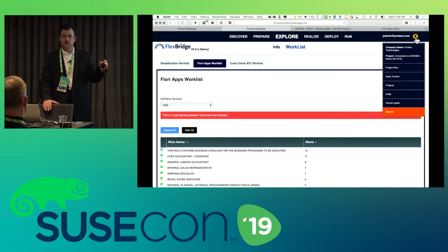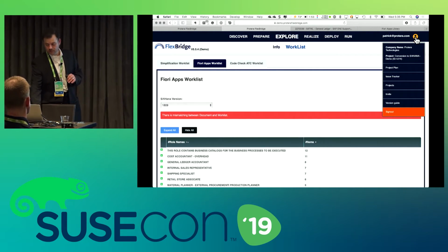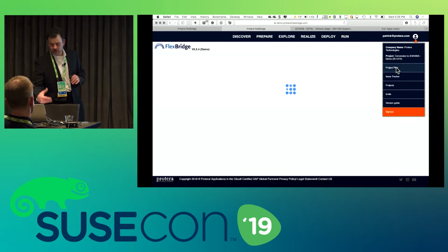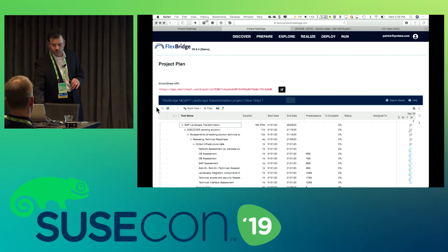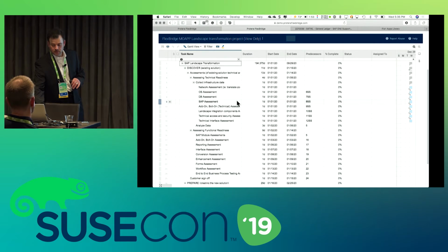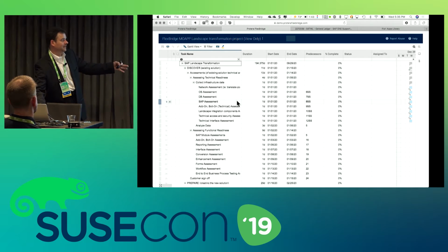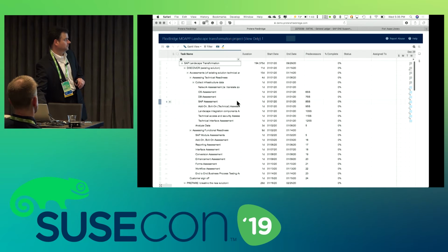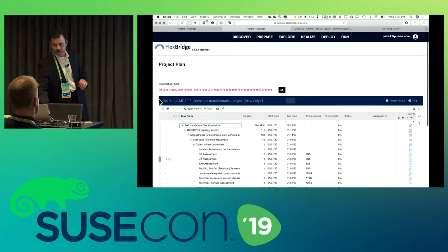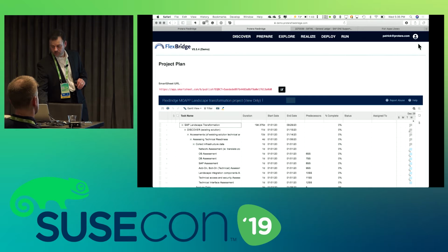So identification and who's doing what, we put it all in the tool set. You can think of this also as providing the capability of a software as a service to provide this project management piece. This is a default template plan. We would customize this for what comes out in the assessment. That alone is quite a big effort when you're doing this the first time. You're trying to identify what the phases are and where the areas of risk are. So that's part of the process.